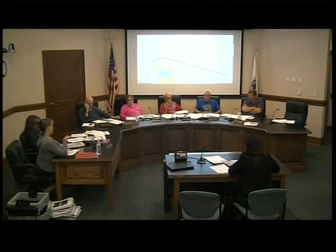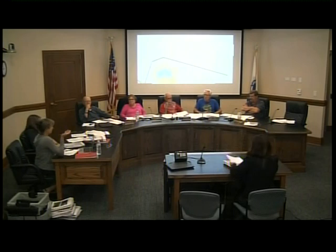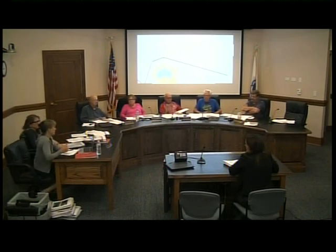Right. My general rule of thumb for amendment versus modification, and I'm not saying this doesn't comply, is if it doesn't get any closer to the wetland and it doesn't increase the scope of work. Well, it does increase the scope of work beyond the original project. So it's still grading for a backyard. And I guess the structure itself doesn't create any more impervious area like a patio or an additional, if it provides a physical separation. I'm not trying to convince you one way or the other. I just wanted to point out it wasn't in my original analysis of this project when I told her to apply for a modification. And honestly, I don't think you saw the plan afterwards either.